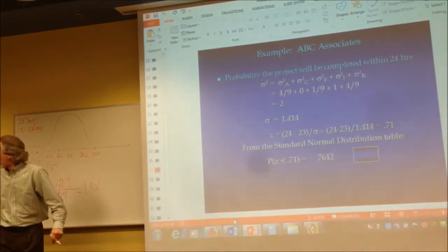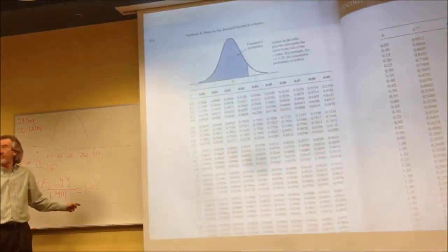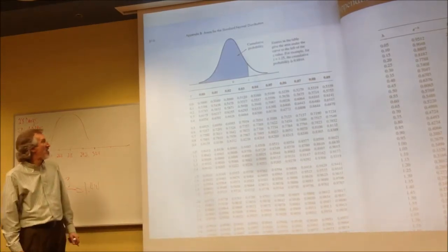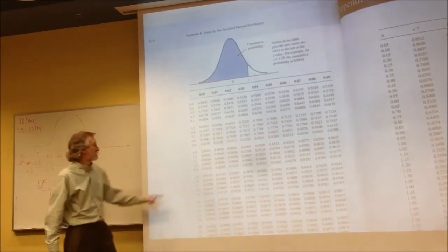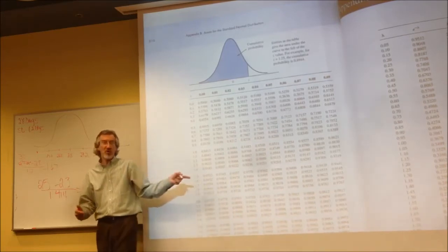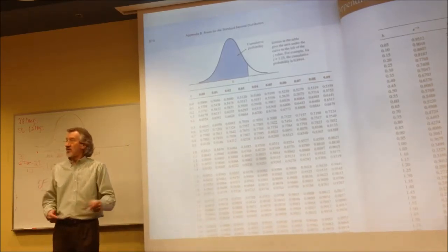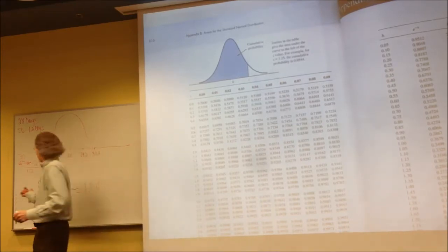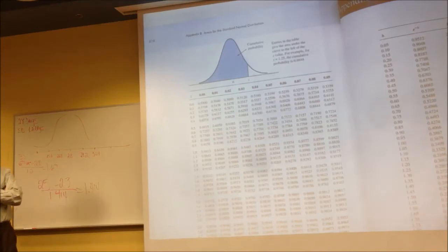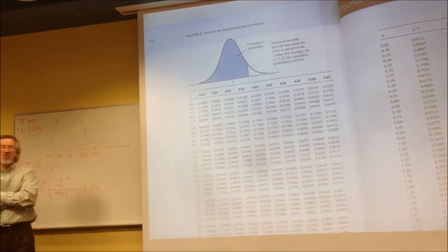All right. We go to our chart. It's a positive 1.414 because what we're asking about is above the expected time. 1.414 should work. I would accept either answer, 1.41 or 1.42's probability, but show off and give me a probability that's between them. Because really, this is almost right between them. If it's right between them, I'll take any of those numbers. So, tell me the probability of this being done in 25 units of time or more.